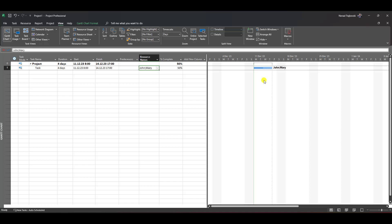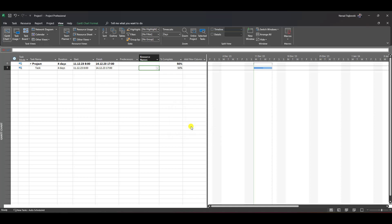I'll go here and erase them. You'll see a message: 'This item has progress. Important: Do you still want to delete it?' If I say yes, John and Mary are gone, but the percentage of completeness remains. The task is still 50% done without them.